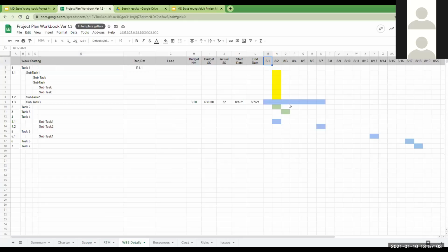In Google Sheets, if you need to change the dates, all you need to do is put 110. And let's say if you want these columns to be weekly, you can put here 117, 124, and then just grab these 3 and drag them all the way. It's going to set it up for you properly, and now you have a weekly schedule. If you want to do daily, which obviously is going to take a lot of columns, just change it to 110, 111, 112 and do the same thing.